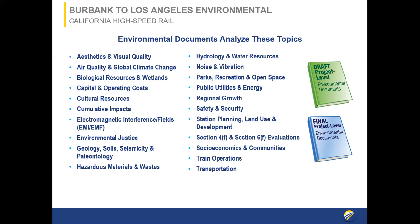Design considerations over the past several years have included following within the existing road or rail corridor as much as possible, adding new high-speed tracks within the existing rail corridor, crossing water crossings such as the LA River in such a way as to not encroach into the waterway, and looking wherever possible to avoid sensitive resources whether natural environment or local community. We've conducted a number of technical studies addressing impacts on the human environment — aesthetics and visual quality, community impacts — and on the natural environment, including biological resource studies, hydrology and water studies, among others.